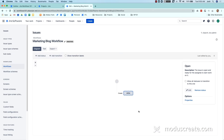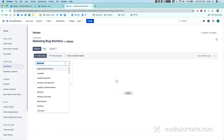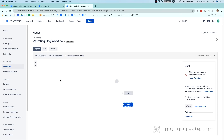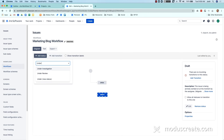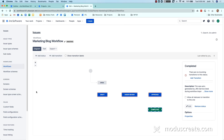We're going to cancel out and add some new statuses to build out what our workflow is going to look like. To add a status, I come up here and can use the select list or start typing. You can see there's a status called 'draft' that I want to use — I'll select it. At the bottom, because I'm a Jira administrator, I have the option to add new statuses on the fly, but you'll want to be careful and try to reuse statuses whenever possible. We'll make sure we select draft, we are not going to allow universal transition, and we'll click add. You can tell the draft color is blue as opposed to the gray of open because draft is an in-progress status.